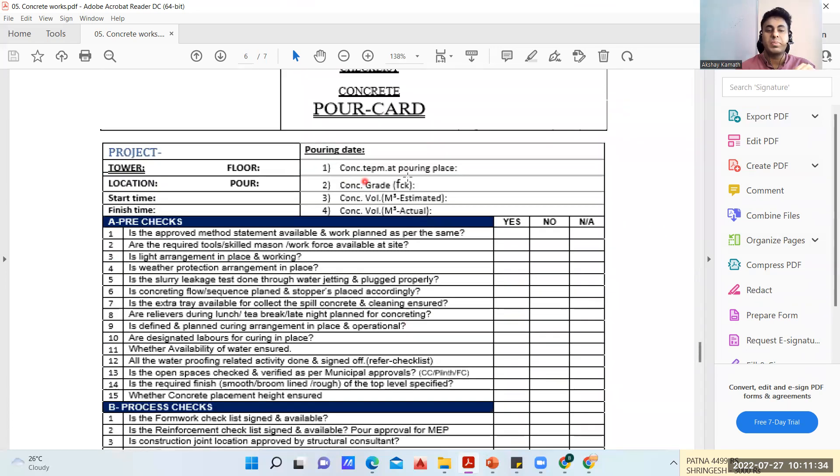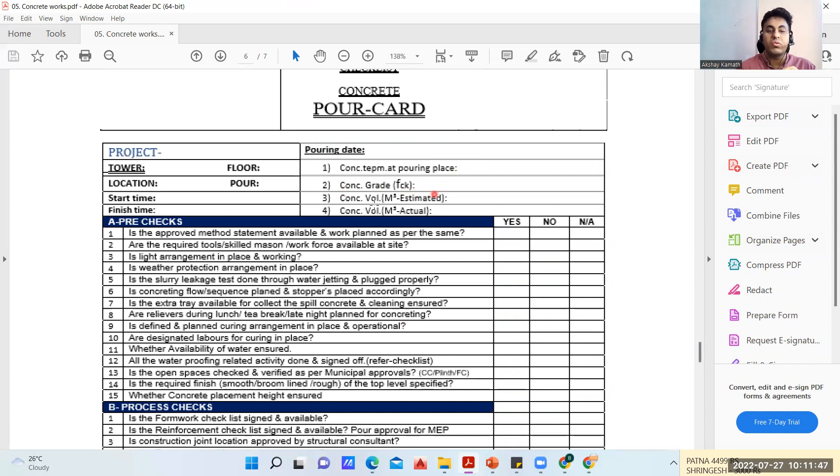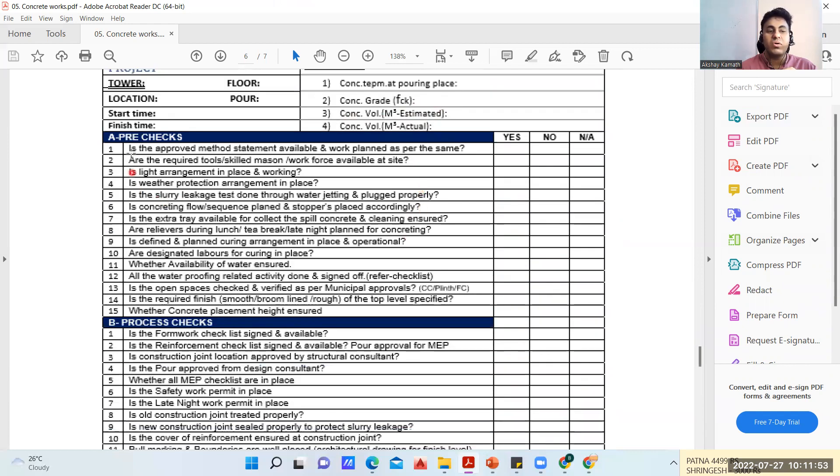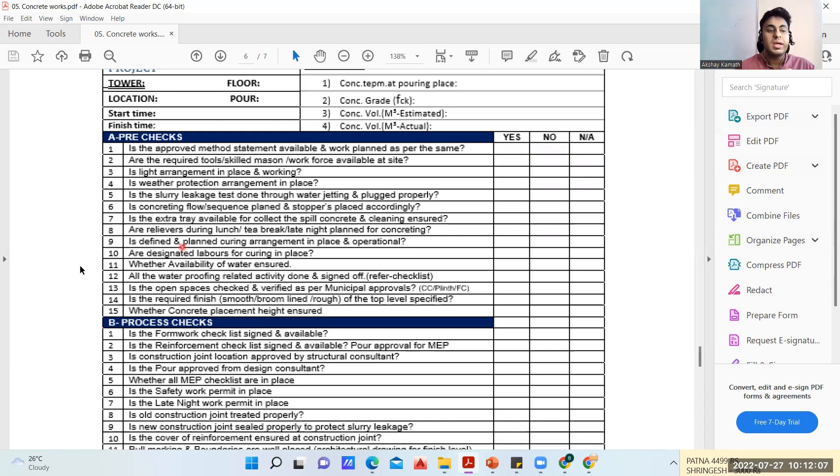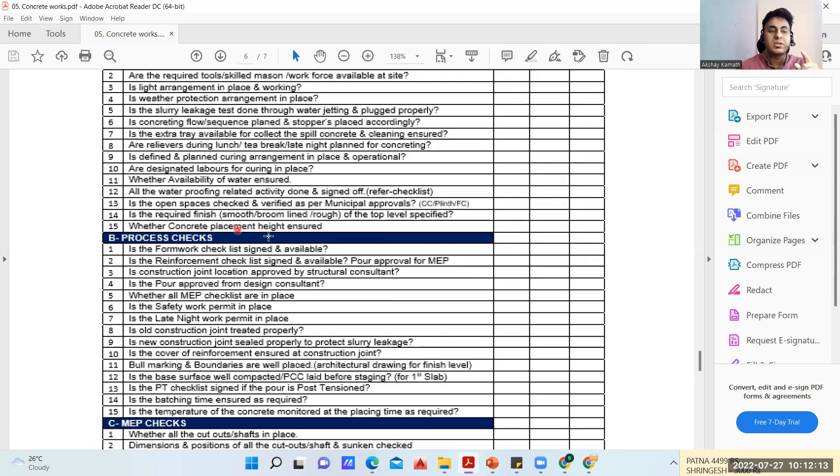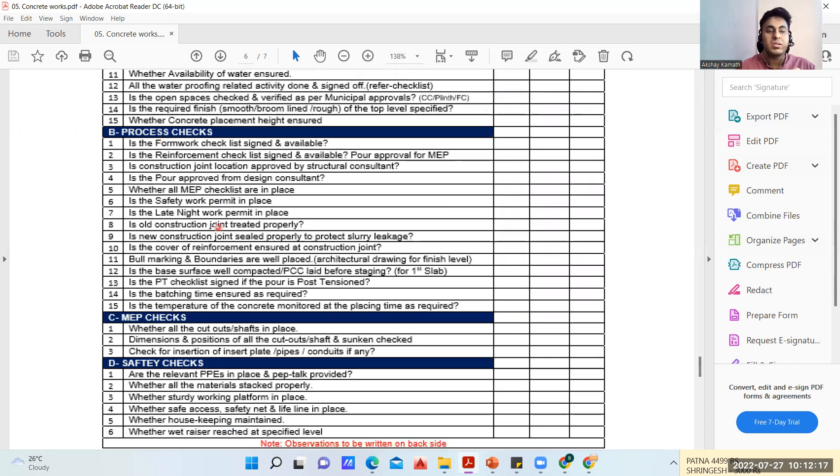Finally, this is a pour card. For concrete temperature, whenever you're pouring concrete you have to check the temperature because 27 to 29 degrees Celsius is the ideal temperature. What is the grade of that concrete, what is the concrete volume estimated and what is actually you have brought. These are the pre-checks: is the slurry leakage test done through water jetting and plugged properly - wherever there is formwork you're going to do a kind of slurry test by injecting water so you get an idea whether water will pass through or not. Are the designated laborers for curing in place, whether availability of water is ensured - all these things are pre-checks.